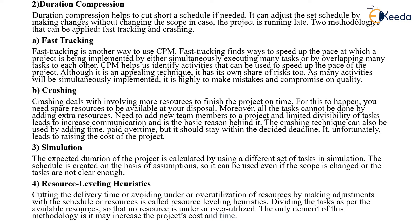The second one is Duration Compression. It helps us to cut short a schedule when needed. It can adjust the schedule by making changes without changing the scope in the case the project is running late. The two methodologies used are fast tracking and crashing. Fast tracking is another way to use the CPM — it finds ways to speed the pace at which a project is being implemented by either simultaneously executing many tasks or by overlapping many tasks with each other.